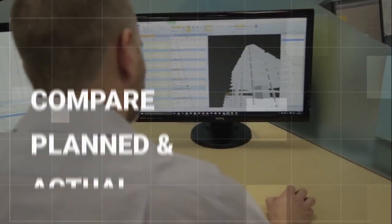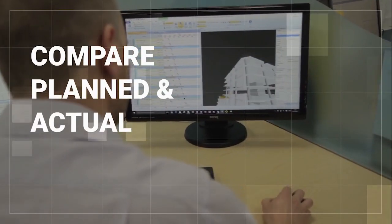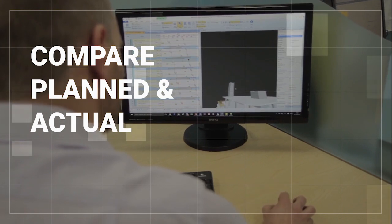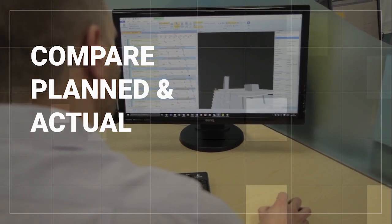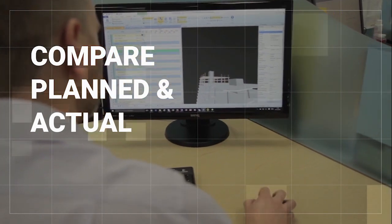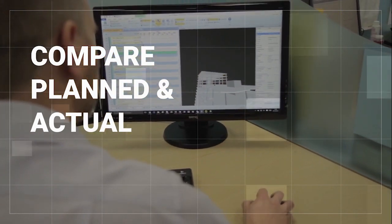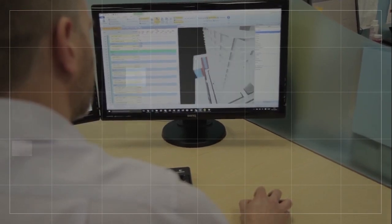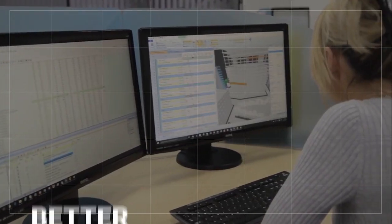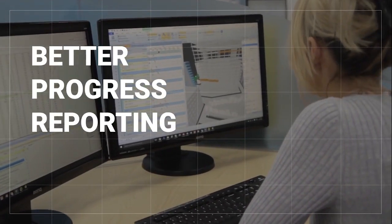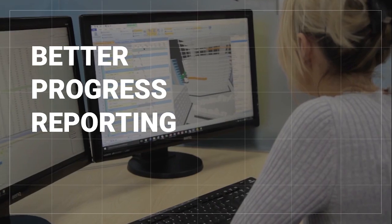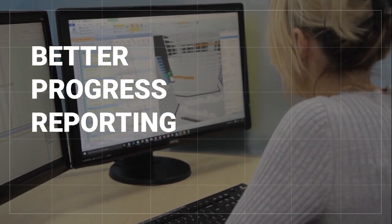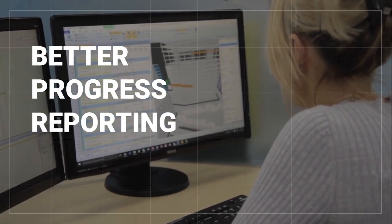With all the information in one place, it is easy to compare planned and actual schedule plans in 4D, utilizing PowerProject's baseline functionality. This means better progress reporting, giving visual indications on what is early, late, or affecting critical path.